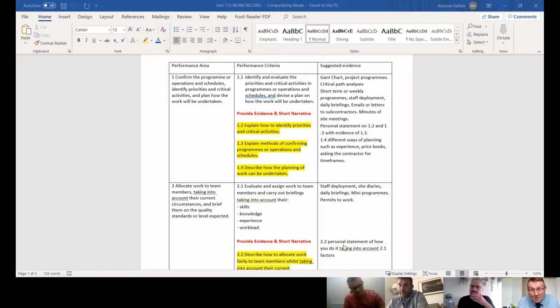I think even within that, though, Kieran, although it is repetitive, you know what the output is, or what's a realistic output. As you say, from a gang of a certain size, you would expect certain meterage. That comes from experience and these projects having been undertaken previously. So a lot of your judgment is based on that experience and previous records. That's an important point. The fact that it is repetitive means you have very defined sequences of work that need to be followed, and those defined sequences feed into the contractor's program.